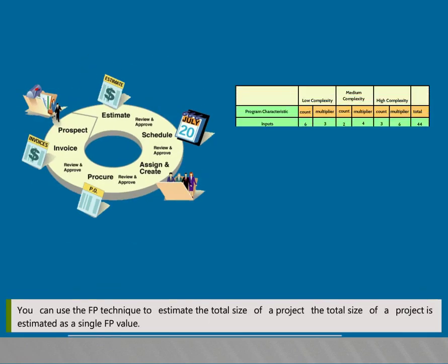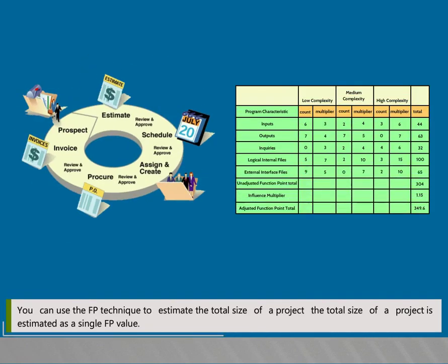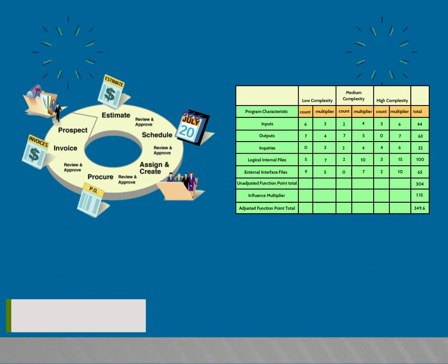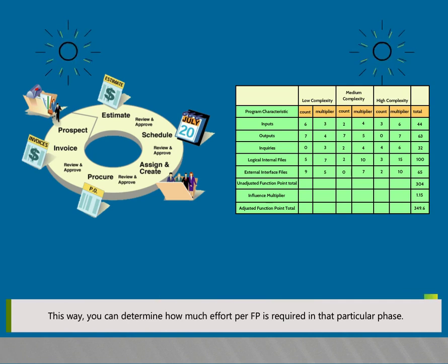Advantages of using function points. Disadvantages of using function points. Function points are language and technology independent. Therefore, you can use them to estimate any kind of project. Estimation by using FP generally uses data from past projects for assigning weights to GSCs and the information domain values.